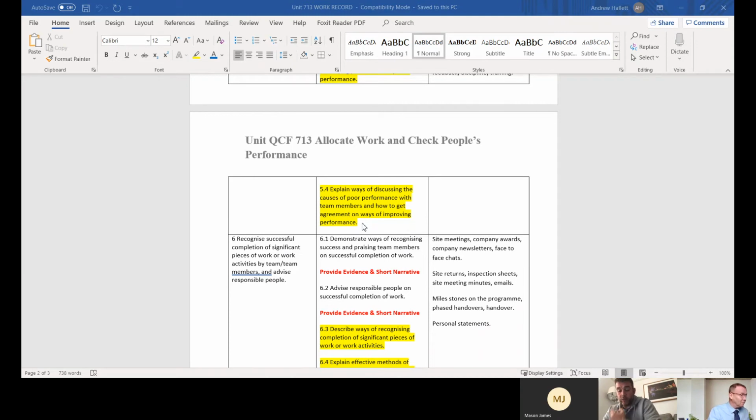So I raised it and said, well, look, you're non-compliant with the design. And their argument was, well, we're matching into the existing. I said, yeah, but it specifies on the drawing the type of footpath that should be in. So I reported it back in our report and sent the email out as well, saying that it was non-compliant to design. The PM sent out an email stating that a TQ needed to be raised. They raised the TQ, and that was formally answered. And what they'd put in, they said, well, now that it's in and the job's complete, we'll accept it.